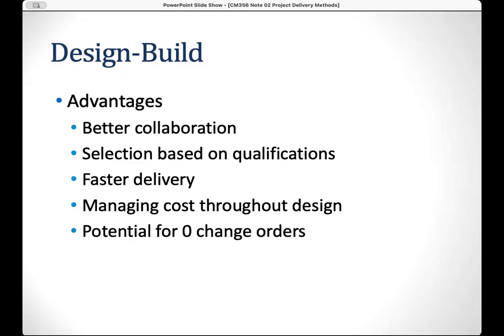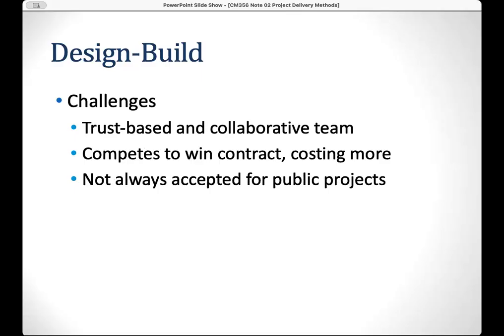So some advantages over here: you will see better collaboration. You will also select based on qualification. You definitely have faster delivery. You can manage your cost through the design. And this has a protection for zero change orders, because the builder is actually involved in the design in the very early stages, right? They actually have control of the design.